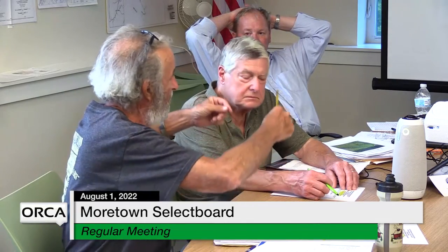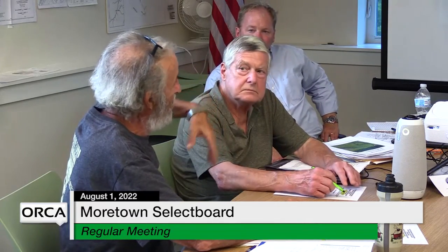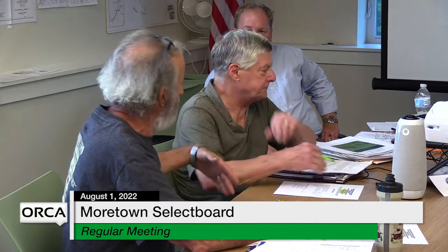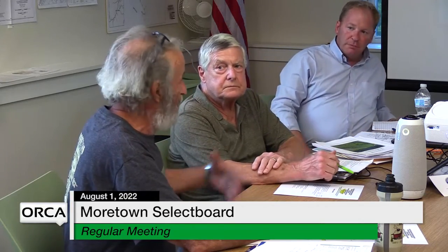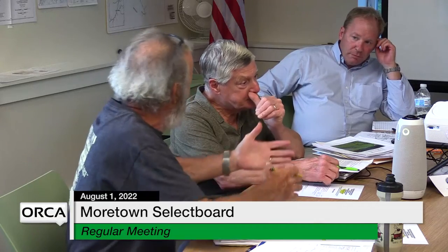The schedule would be that by November, in December, we would have a construction cost estimate, so that we can then look at town meeting and what we would put up for people to vote on, and what we could get for grants and all that. So my take on it would be not to wait till November 1st, because the firm can't start unless we tell them to start and then get the money in November, which I don't know if we could do.